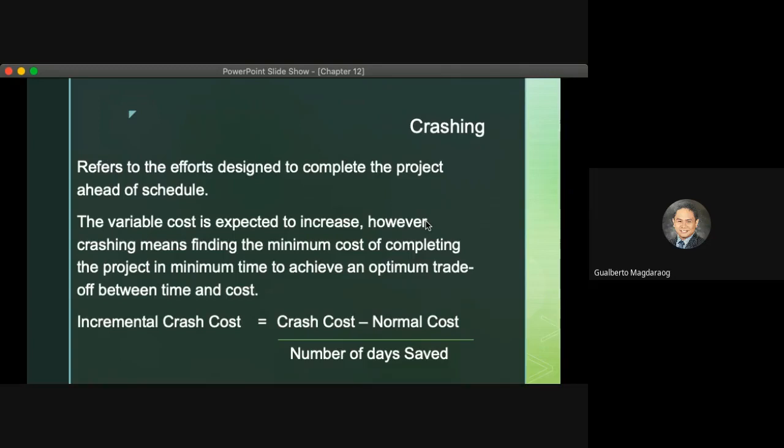This refers to the effort to design to complete the project ahead of the schedule. And expect whenever you crash, the variable cost will surely increase. However, crashing means finding the minimum cost of completing the project in the minimum time.